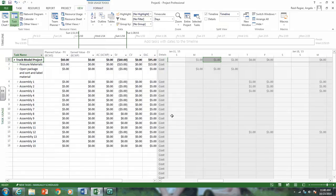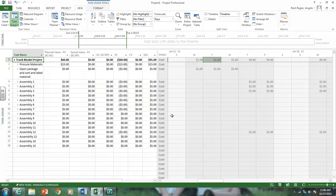There we go. As you can see, it's showing us our plan value. As of January 28th, we should have done $60 worth of work. And it's showing us we've earned $0. That's because we haven't put in any status.